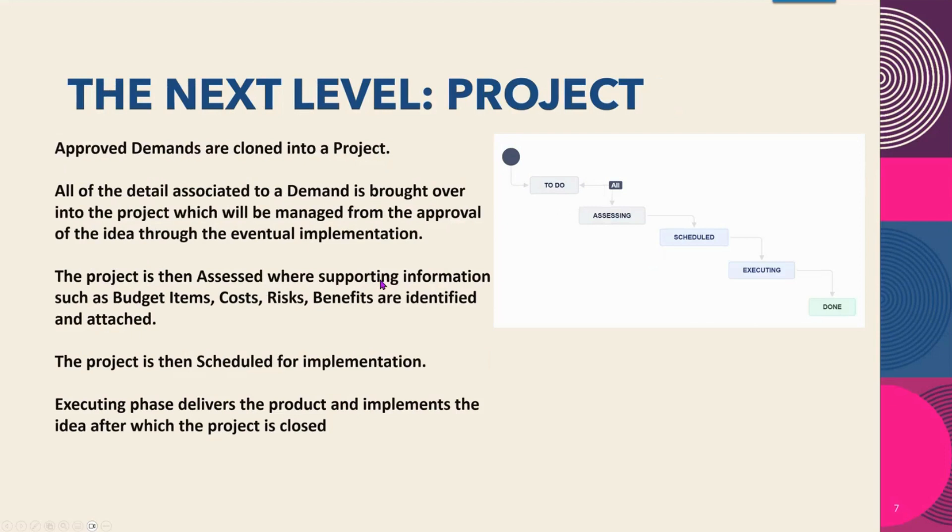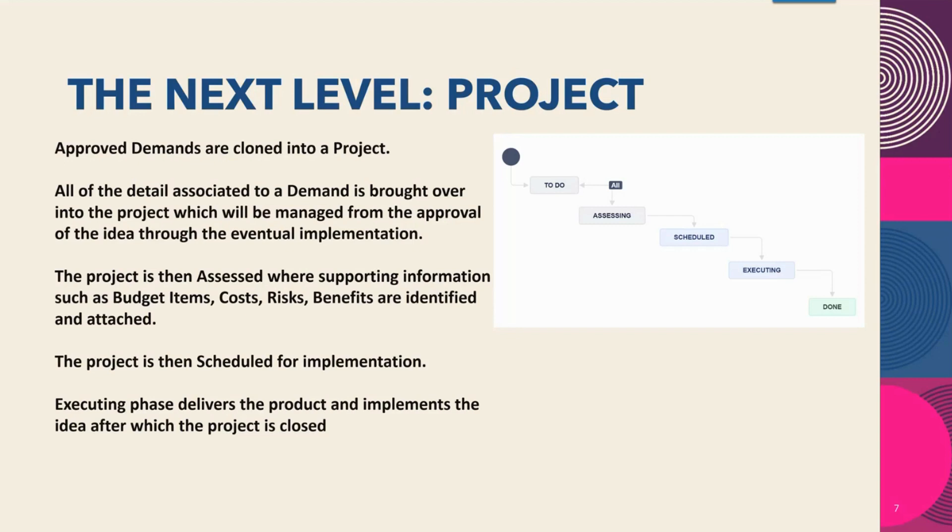The next level, project. Approved demands are cloned into a project. All of the detail associated to a demand is brought over into the project which will be managed from the approval of the idea through its eventual implementation. The project is then assessed where supporting information such as budget items, costs, risks, benefits can also be identified and attached. The project is then scheduled for implementation. Executing phase delivers the product and implements the idea after which the project is closed.